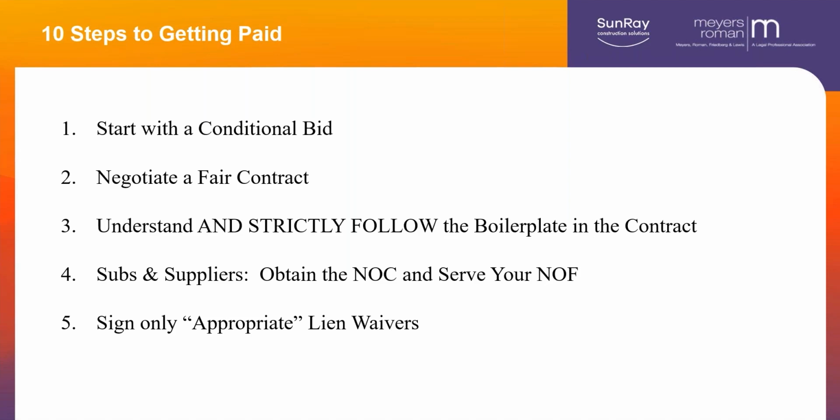They're not going to catch everything, but say there is a subsurface condition that was unexpected. Well, what do you have to do? Can you just go ahead and handle it? Do you have to give notice? When do you have to give notice? If you don't give notice by that time, have you lost it completely? And the answer generally is yes. So you have to follow everything that's in your contract if you want to have the better side of the argument if it ever comes down to a dispute.